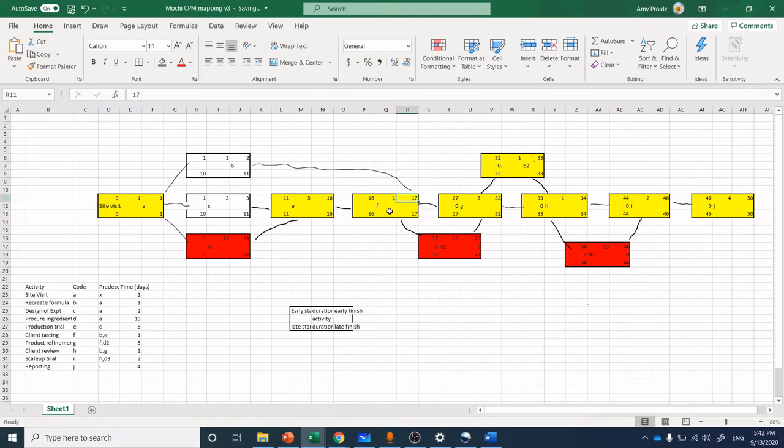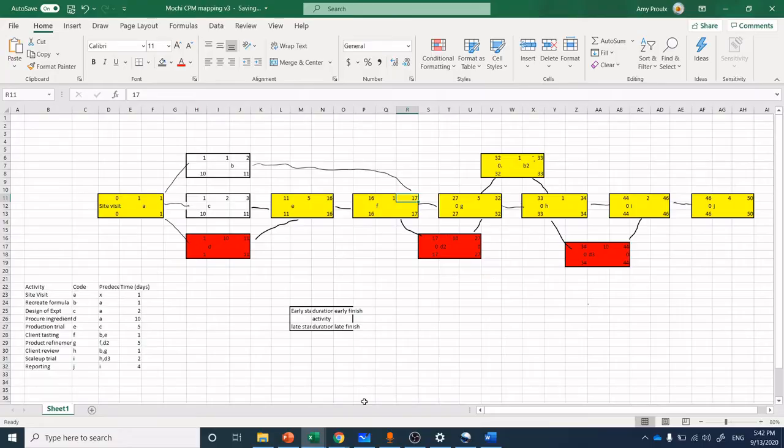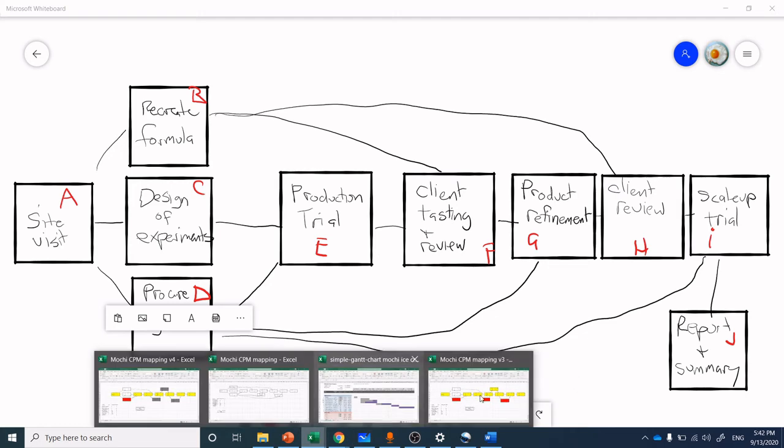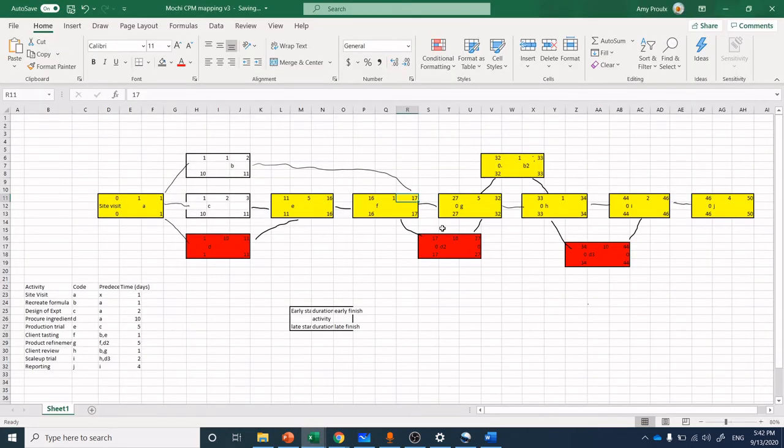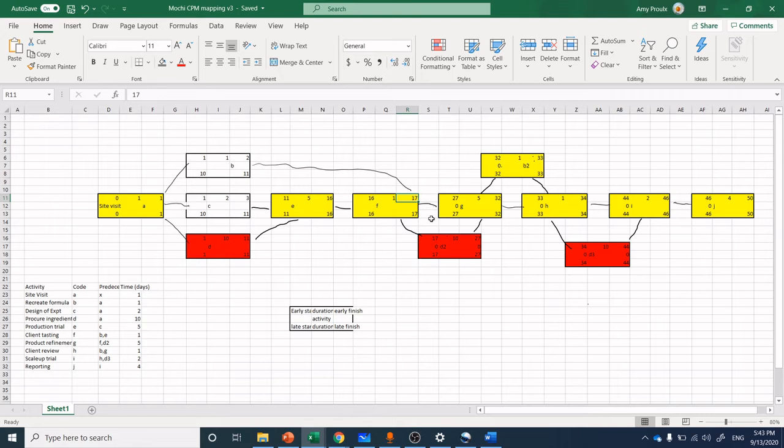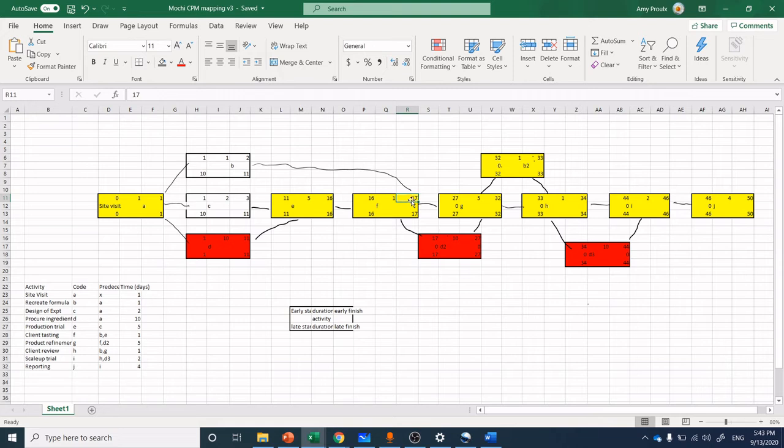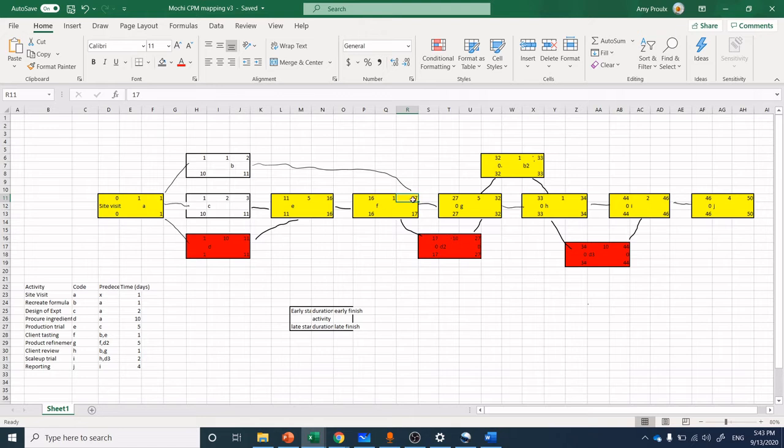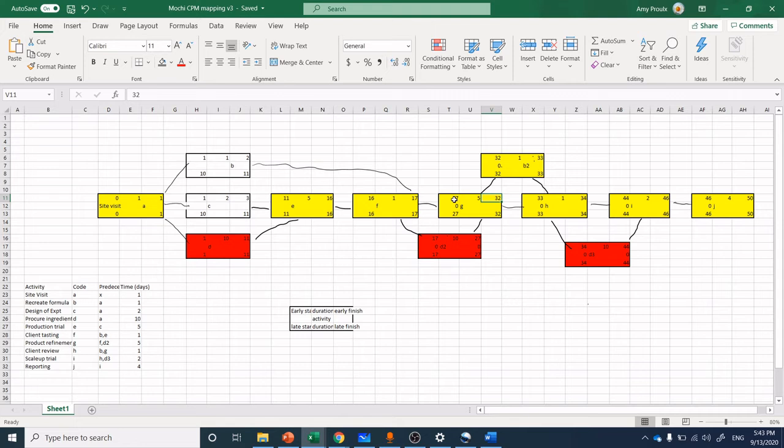So day 11, let's say we have five days for production, so 11 plus 5 is 16, and we move forward 16 plus 1, and so this is our client tasting. So 16 plus 1 is 17. Now, at that client tasting point, in my initial whiteboard, I had just said procure ingredients once, and wait a second, I really, as I was thinking about this, wait a second, the client tastes it and says, well, I'd like to do this flavor, or man, the texture's off, I'd like to try this functional ingredient. We may have to go back and retouch that procure ingredients. And so wait a second, we have that 10 days lag time in there again.